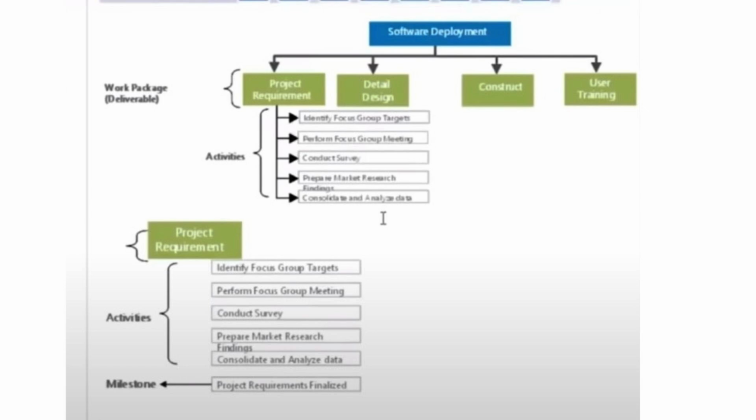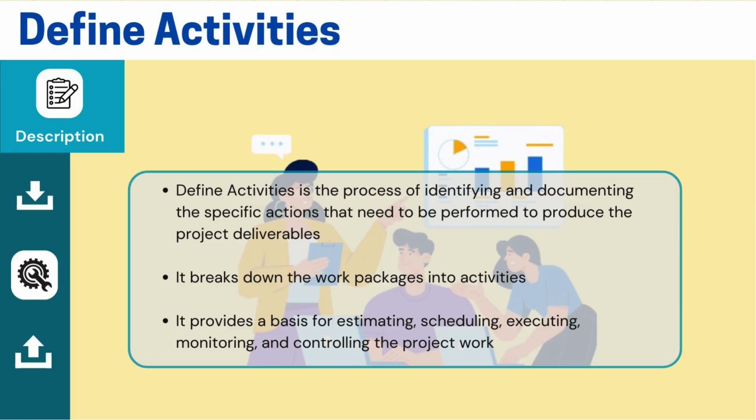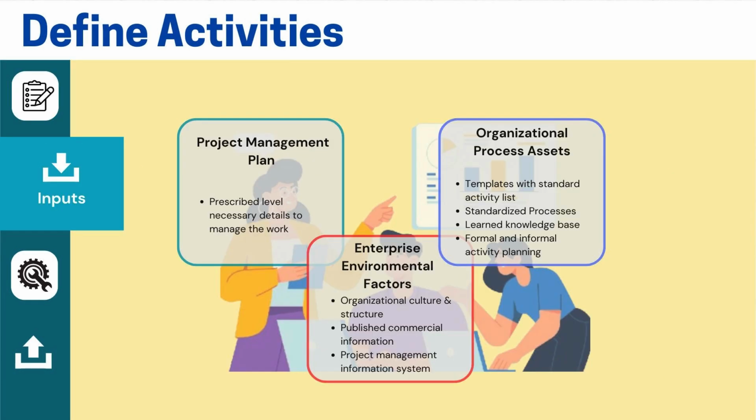One of the techniques we use here is decomposition. We decompose these work packages into smaller activities, which will help us in better estimation. What inputs can be used in defining activities? First, we refer to the project management plan to understand the approach we are going to use.